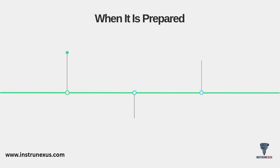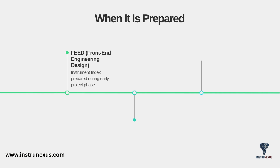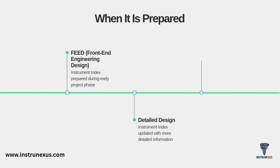The Instrument Index isn't a document you create just once — it's a living document that evolves as the project matures. It begins during the FEED stage, or front-end engineering design. A preliminary version is prepared during this early project phase, often with just the tag numbers and key service descriptions. As the project moves into detailed design, the index is continuously updated with more and more detailed information, adding data from process, vendor lists, and electrical. Finally, once all designs are firm and all data is in, the Instrument Index is finalized and becomes part of the IFC, or Issued for Construction, package — the official approved document for procurement and construction teams.